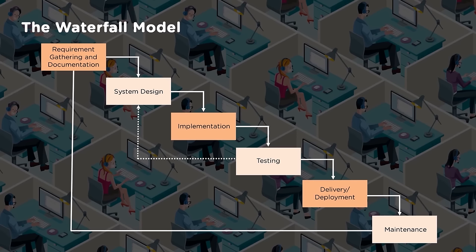But the challenge comes up when the dynamics in the market and the dynamics of the customer change. The customer asks for a change, then you may be required to do the change. But you can do that change only after understanding the impact of this change on the entire output you're going to create, which is very comprehensive. Because of this, it consumes time and extra effort. So it may be a scenario where the scope of work is reduced as well. Even after that, this exercise has to be done, which will delay the project.